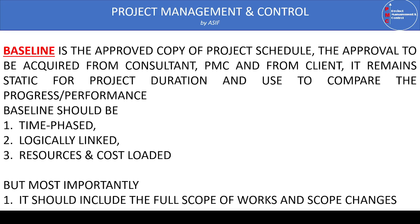It is easy in this case to compute the performance percentage and progress of the project. The most important feature of the baseline program is that it should cover the full scope of the project. If there is any scope change, it should be reflected in the baseline program. The baseline should cover any changes made during the design stage and prior to project commencement.